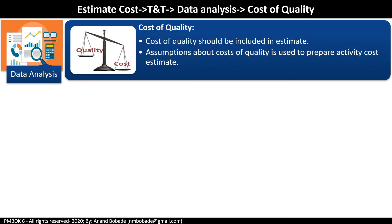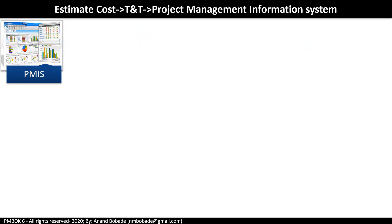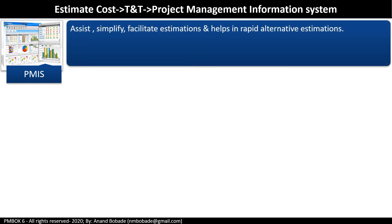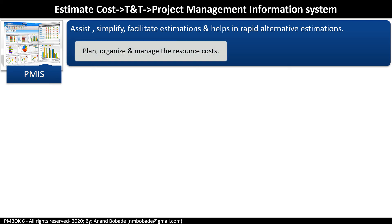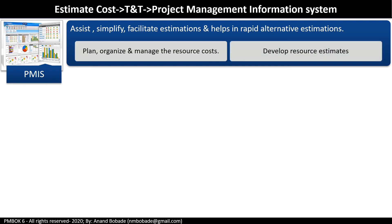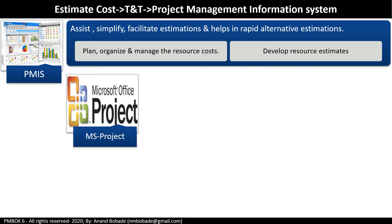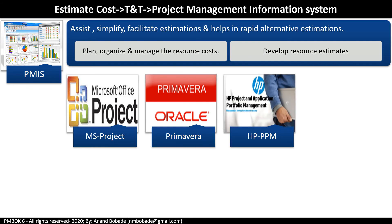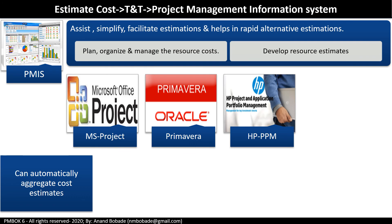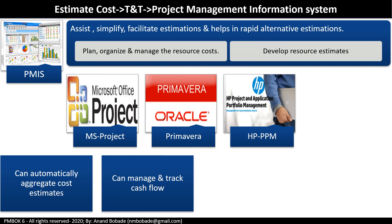Cost of quality should be included in estimates. Assumptions about the cost of quality are used to prepare activity cost estimates. Project management information systems (PMIS) are software tools that help project managers simplify and facilitate estimation and enable rapid alternative estimation. They help plan, organize, and manage resource costs and develop resource estimates. Well-known PMIS tools include Microsoft Project with SharePoint, Primavera, and HP Project Portfolio Management System. These tools can automatically aggregate cost estimates, help manage and track cash flow, and generate various reports.